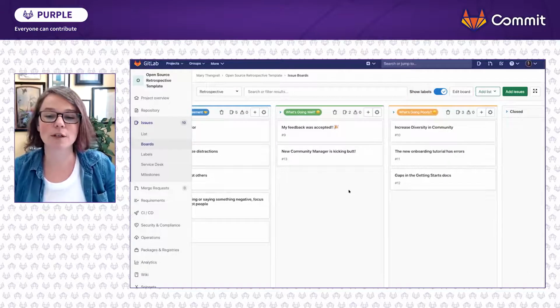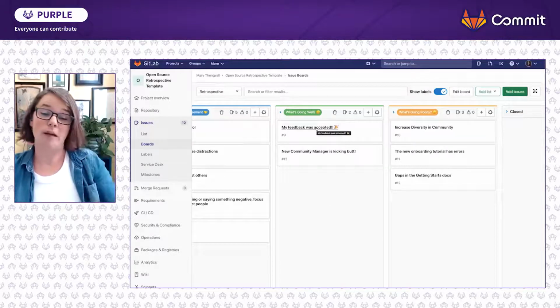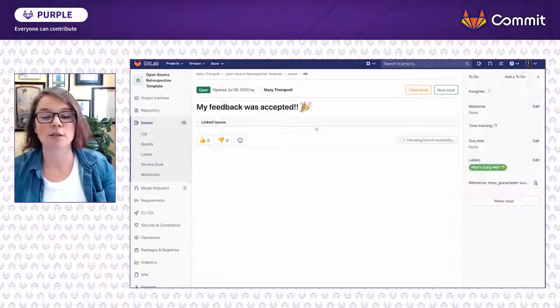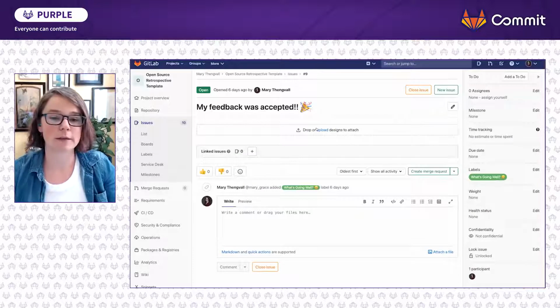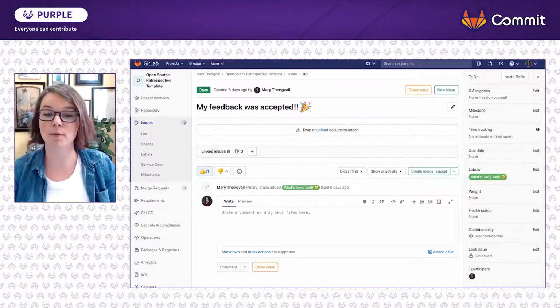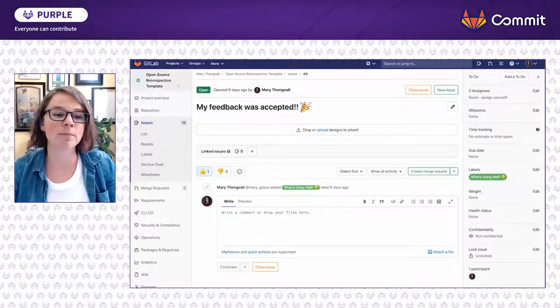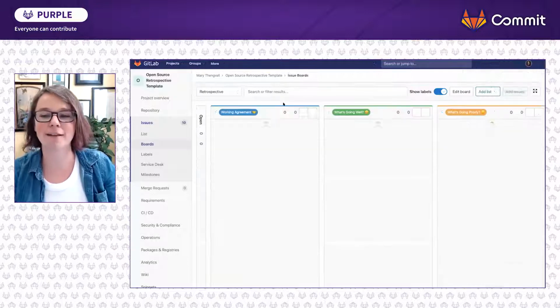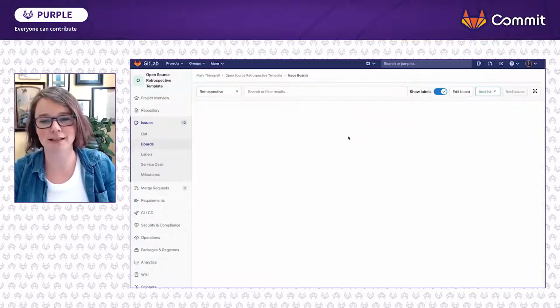So as the person who is running this retro, once you take a look, you can start reading through things. Start with the what's going well column and read through each of the issues there, and then invite people to vote. And specifically using GitLab issue boards, folks can actually just go in here and add a thumbs up to this particular card. And you vote because you might not have the time to cover everything that's in here.